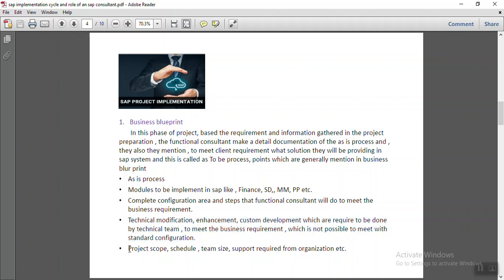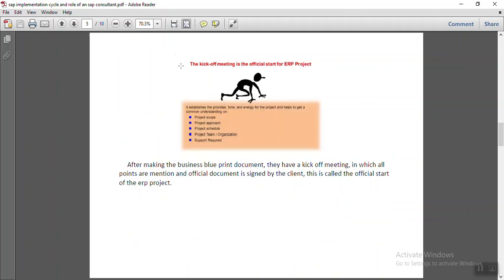They also decide the project scope, schedule, team size, and the support required from the organization. After preparing the business blueprint, they hold a meeting with the client called the kickoff meeting. In the kickoff meeting, they share the complete business blueprint document and obtain the official sign-off from the client, which marks the official start of the project.